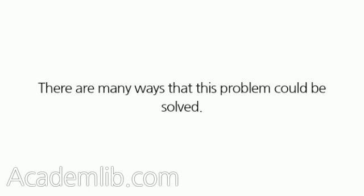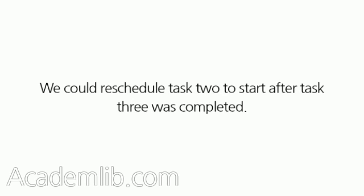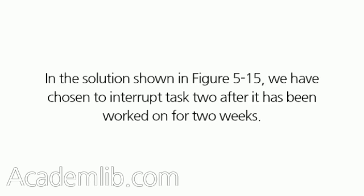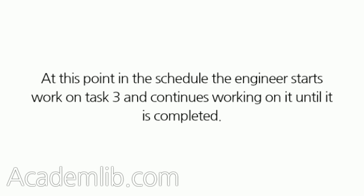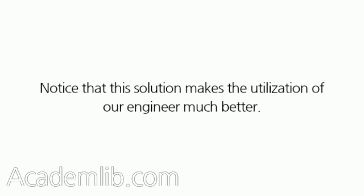There are many ways that this problem could be solved. We could delay the start of Task 3 until Task 2 is completed, or reschedule Task 2 to start after Task 3 was completed. In the solution shown in Figure 5-15, we have chosen to interrupt Task 2 after it has been worked on for 2 weeks. At this point in the schedule the engineer starts work on Task 3 and continues working on it until it is completed. When Task 3 is finished, she starts work on Task 4 and continues work on Task 2.